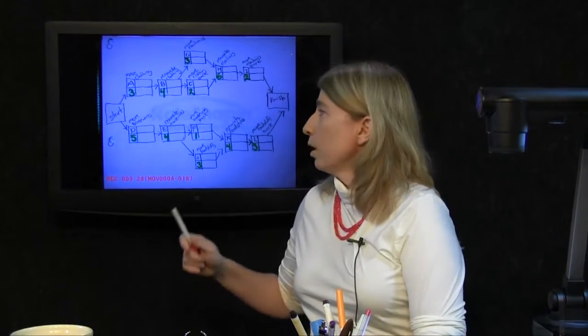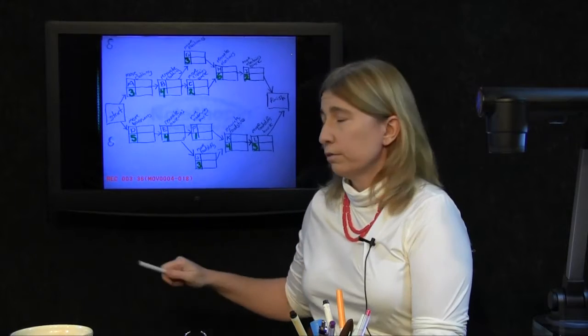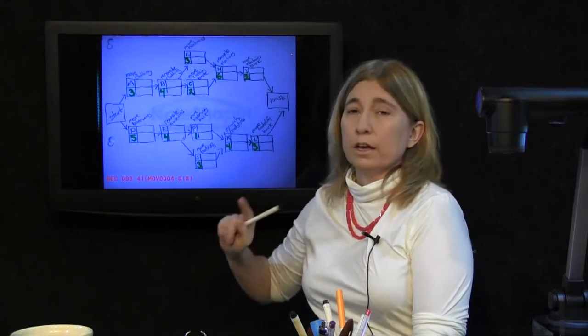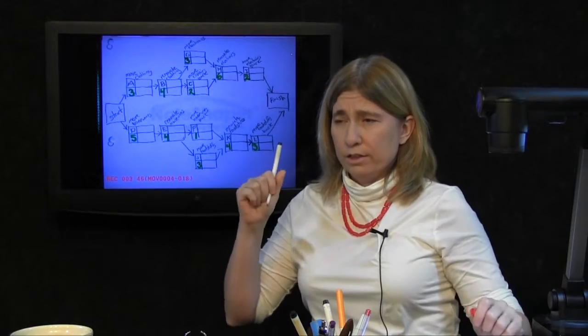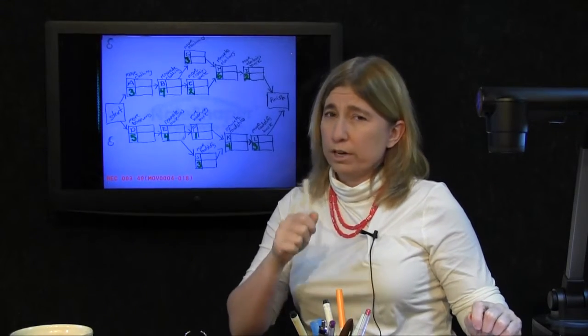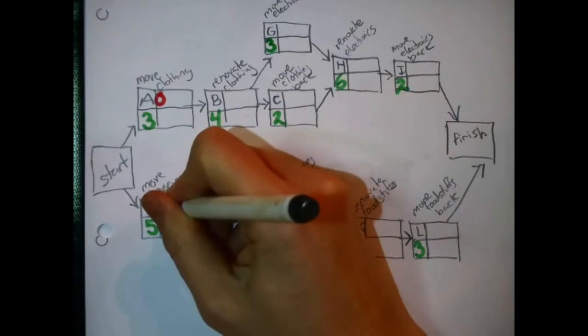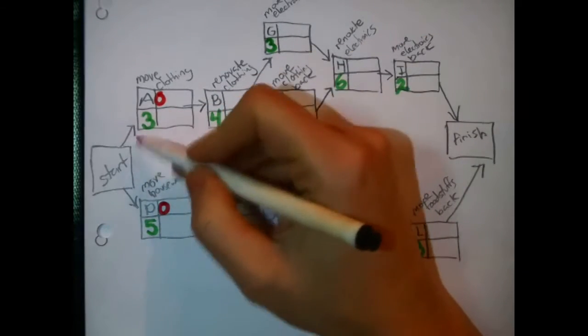Now it is time to do some actual analysis. We want to answer the question about the completion time by finding the early start, early finish times. For these tasks, you find early start, early finish times by beginning at the starting node, noting each activity that is attached to the starting node, so to speak, and noting that the early start time for each of those tasks is, for a fact, 0. Because 0 is right now on a number line, and that's what it means by these being attached to the start. If you wanted to, at the earliest, you could start on these right now.